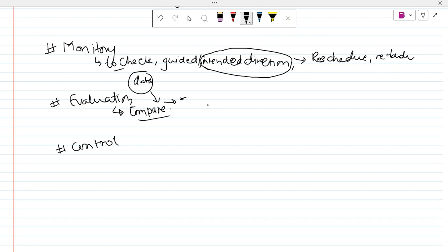This evaluation can be routine or special. Like we evaluate twice a year, half a year each, and this is known as routine evaluation. If there is a problem, it will cause a special evaluation to be done. Why is the evaluation done? It is to check for the fund use, accomplishment of the scope, and scope improvement of the project, etc.